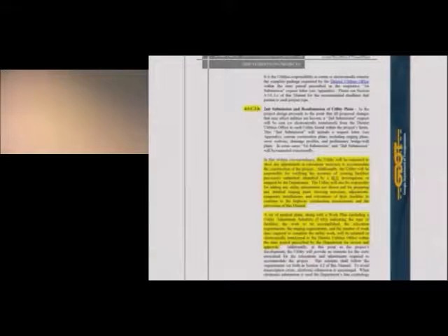Now this is a handout of 41C1B, which addresses making sure that your facilities accommodate the construction of the project, and that if there's any staging needed for your work to accommodate that work, then that should be identified by you as the utility owner. And then 41C1D, which addresses the responsibility to coordinate with any other impacted utility facilities so that no foreseeable conflicts are shown. So there is a responsibility not only on the department but on utility owners to address any conflicts on a department project and to help coordinate and resolve those conflicts.